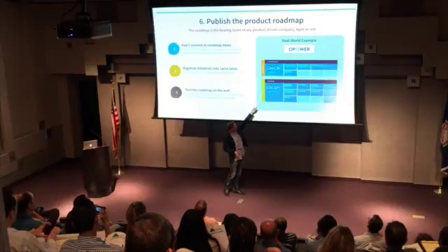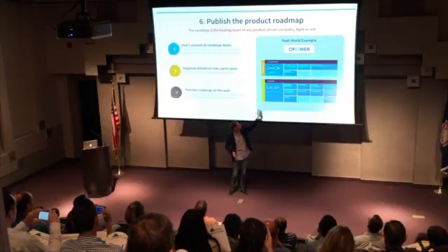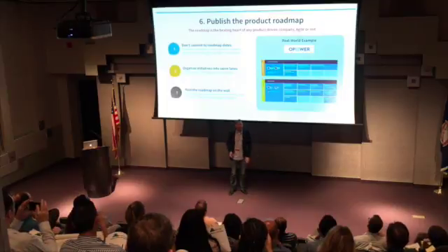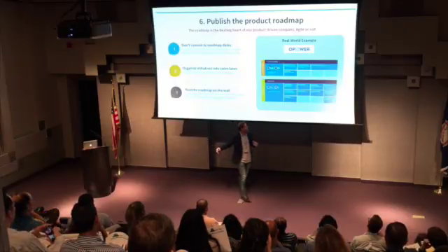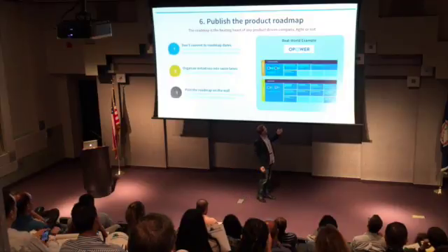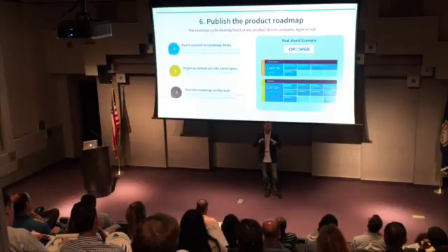This was the new markets team that was working on a bunch of different delivery over the course of different quarters. Here's what we were basically saying we're going to get done. There's no dates necessarily attached to this, but every once in a while, because it was really critical for the sales team, and the sales cycles were so long, we did actually have to make a feature-date commitment. And what we would say is, we're going to shuffle risk around as necessary to make this happen. So we couldn't commit to everything, but we might be able to commit to 25% of the roadmap by shuffling the risk that would have been on that 25% to other stuff.